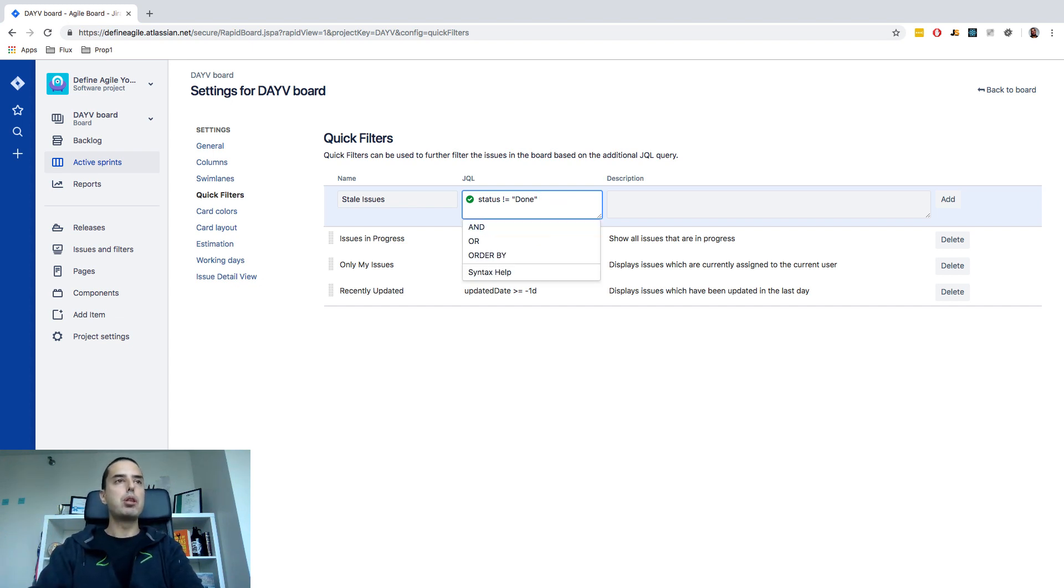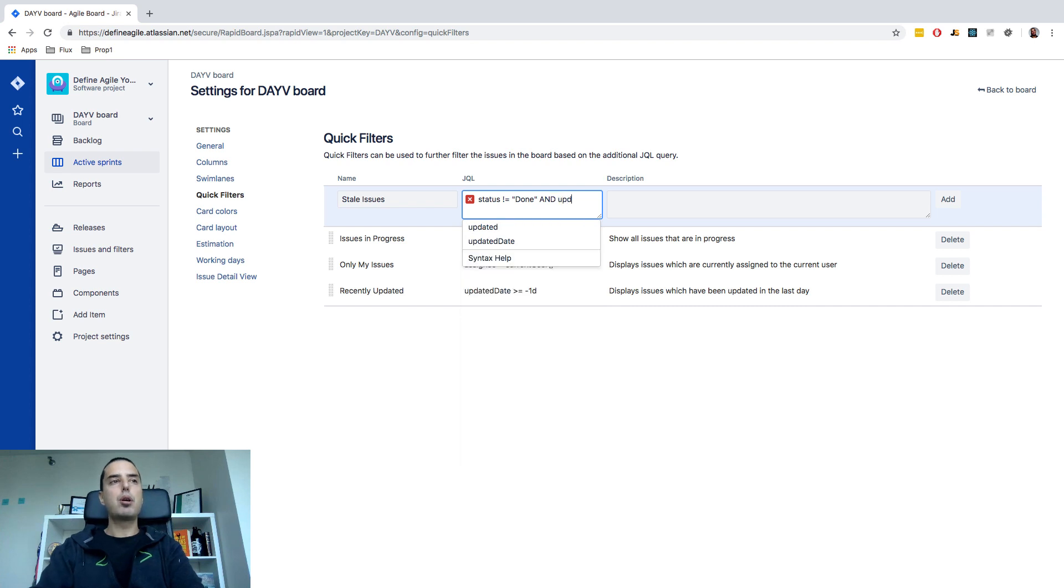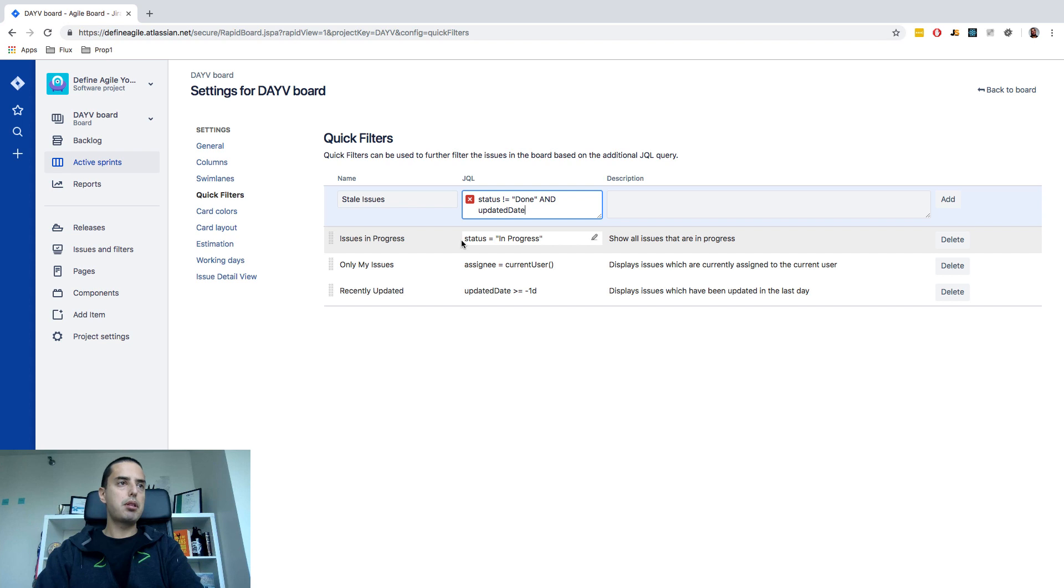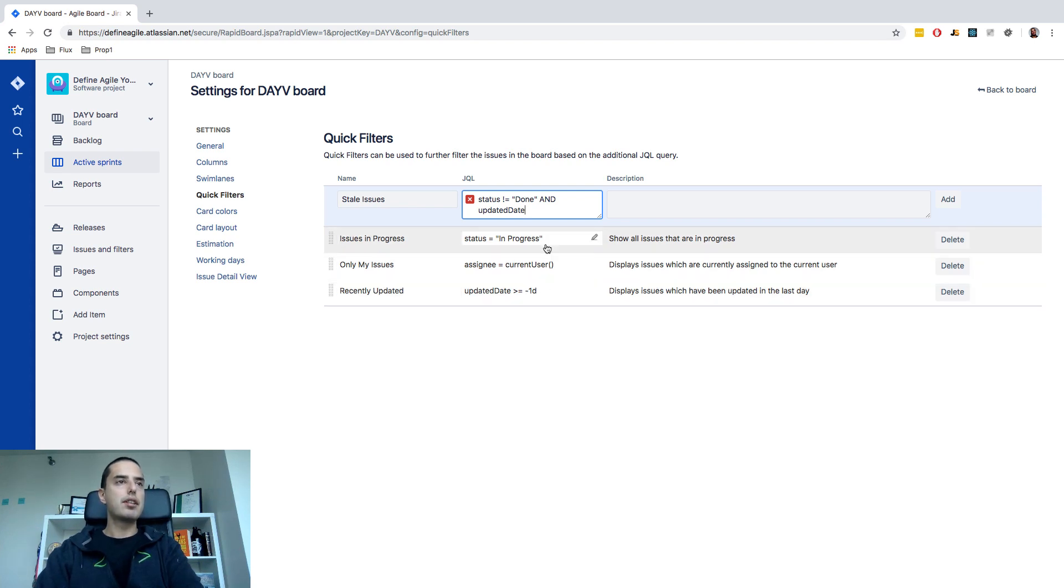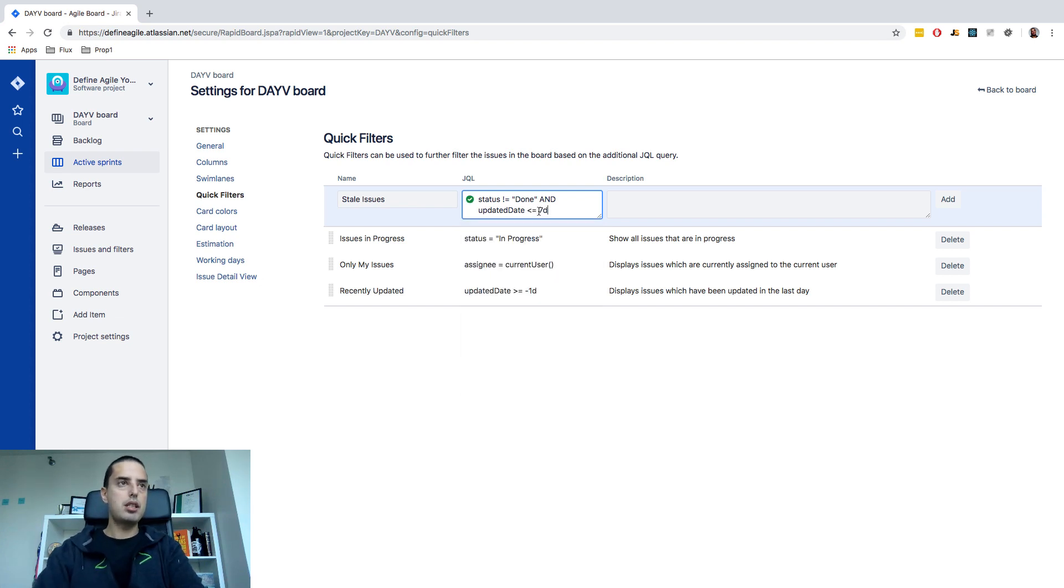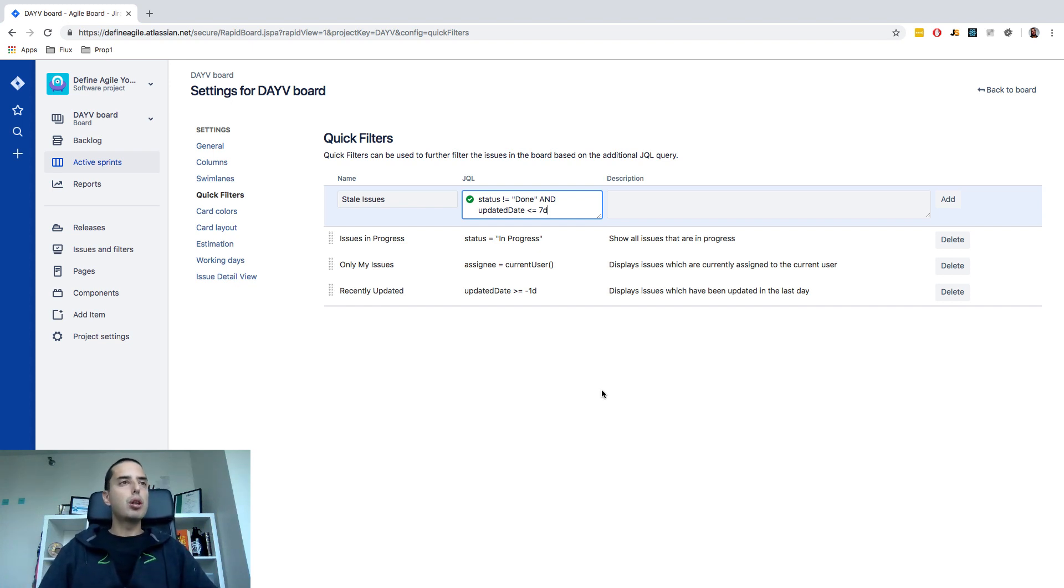So we do AND and AND allows us to pipe together multiple conditions which is good. Then we go to updated date or updated. So you can use any one of those I'll use updated date. So it's similar to recently updated. We just need to reverse this condition. So we need to say less than or equal to minus seven days and it will actually show us everything that was updated seven days or longer and status is not done.